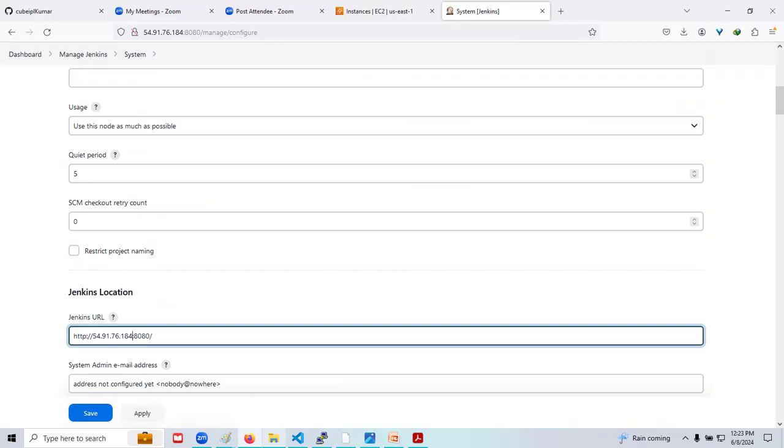Earlier, before Scrum, after the project, we would have this best practices meeting. But before getting into the new project, in between, we had 2-3 months. In those 2-3 months, whatever points we discussed in the previous best practices meeting, we almost forgot. But here it is not that case. The sprint is completed, and in the next 2 days, we'll be having another sprint. So there is no chance that we might forget it. Okay. Unless and until we are gathering.